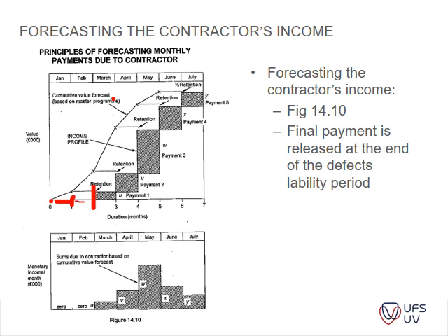And then you continue with your work, so your cash flow continues to be an outflow, and only after the second month you get your first payment. Then you put in your second claim, and that claim you only receive in month 3. And so forth. So you can see it's also on the previous month's work that you've done. So there's a continuous deficit that you have as you go along. Okay, then monetary income. This is just a bar graph of the above.